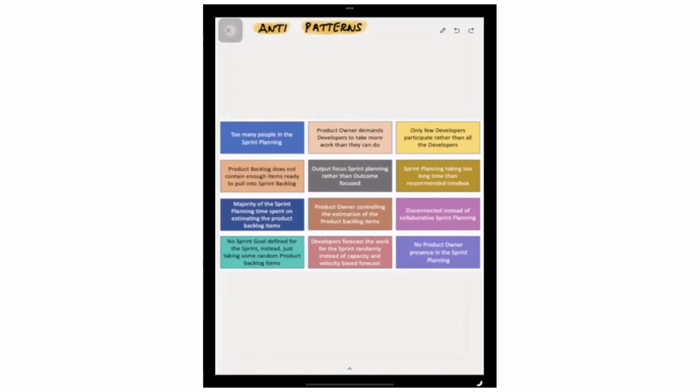Imagine if a product owner tells the developers, guys, I want you to do login using Facebook ID and I'll give 2 story points. I want you to do my dashboard element with some 3 to 4 widgets and I'll give 8 story points, like this. If the product owner decides, the developers will not have any commitment and accountability, because they are not giving the estimate.